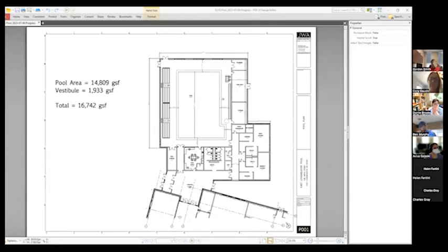The things we're interested in confirming today are the dimensions of the pool deck area and the depth of the pool. We haven't discussed the depth at any great depth. And that's where I know that you all have been thinking about your comments. And again, reminder that the depth issue is critical to the design of this juncture because according to code, it determines the number of fixtures in the pool area for the toilet rooms. So right now we have a pretty good assumption, but we need to confirm it.